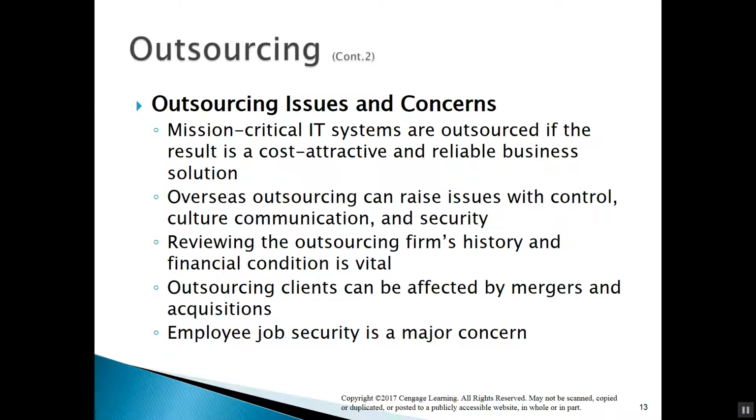So what happens in a system that we're dealing with in system analysis design, where we outsource some component of development? All too often, that will push back our project as a whole, because that could be on our critical path, and more than likely it is.